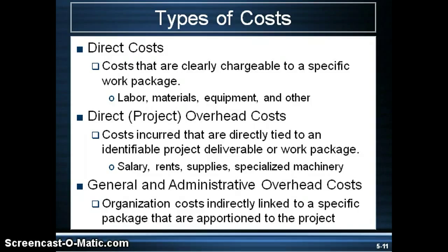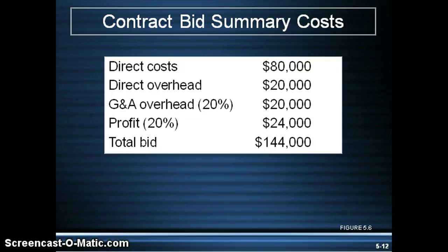Direct project overhead is generally a ratio or percentage of the value of the resources used — like say 20% of the direct project costs. General and administrative costs, or G&A overhead costs, are organizational costs that are not directly associated with the project, such as advertising, accounting, and senior management. These represent a percentage of the direct costs plus the direct project overhead costs.